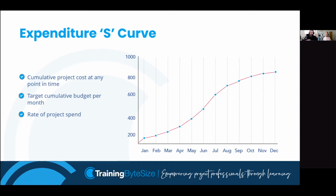But to avoid the project going on and on forever, we fix a time, we fix a budget. And then we distribute that budget to the time boxes and say, right, we'll allocate a bit to that time box, a bit to that one, a bit to that one. And we know each of those time boxes will last 2 to 4 weeks, which will indicate how long we want to spend on the project. So we monitor using time boxing in an iterative approach. We don't use EVM. As I said, I can't imagine how EVM would work in an iterative project for that reason. So it requires more careful management of the budgeting based on an overall set budget.